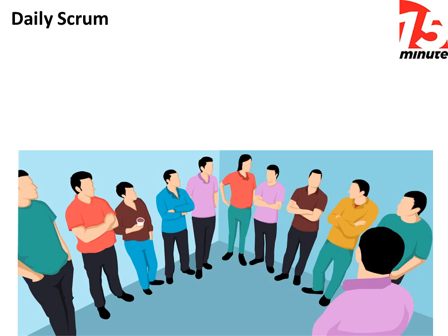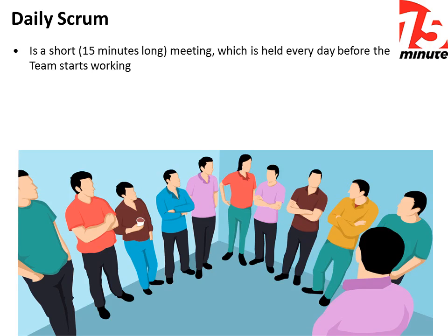Now let's go to the daily Scrum. So let's start by saying it's always 15 minutes. It's not going to go up or down. It can be less, but it shouldn't go up beyond 15 minutes, even if you have a little larger team size.